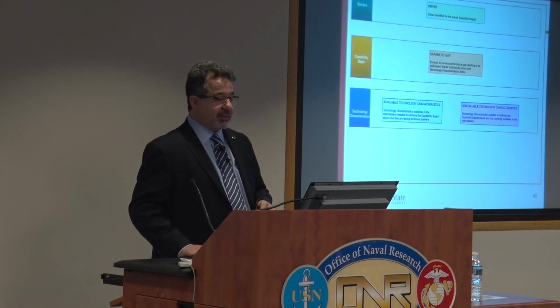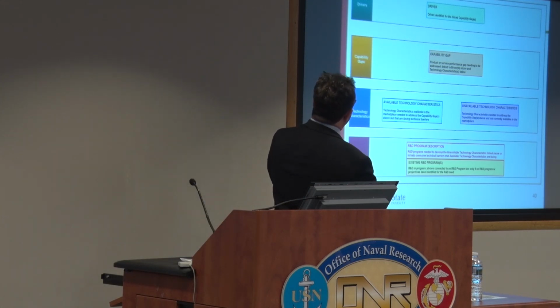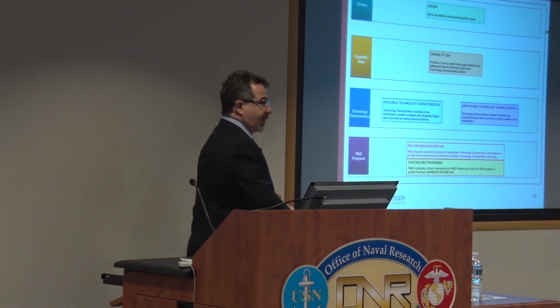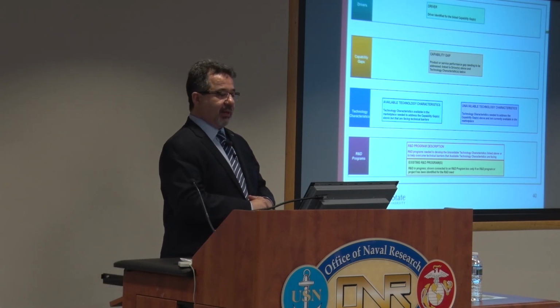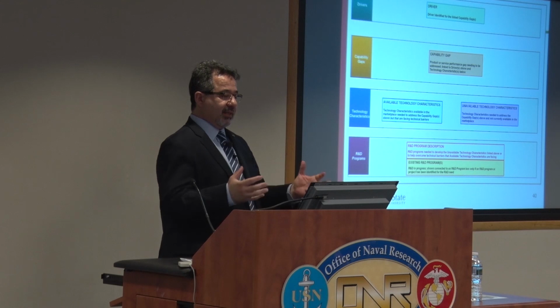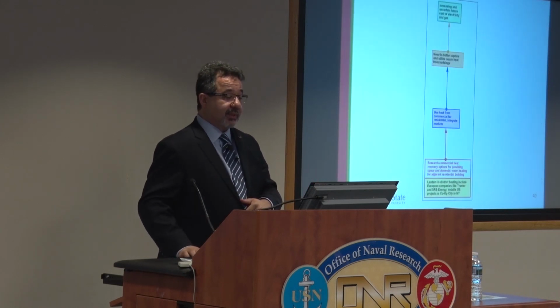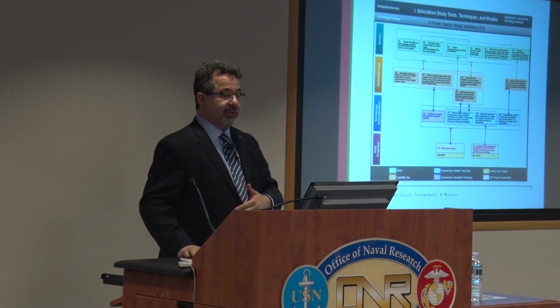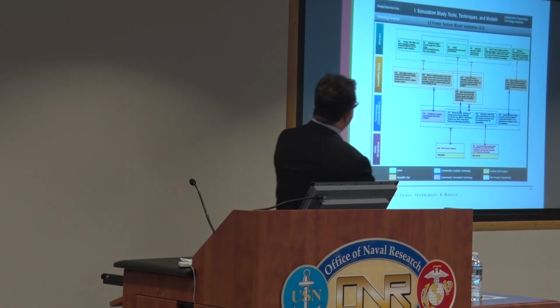And then for this series, we adopted this nomenclature: drivers, capability gaps, technology characteristics, R&D programs. And that really worked well with other roadmaps in the power sector, where it's really a service sector, not a product-driven sector. This is another example, which again ended up with roadmaps like this one.